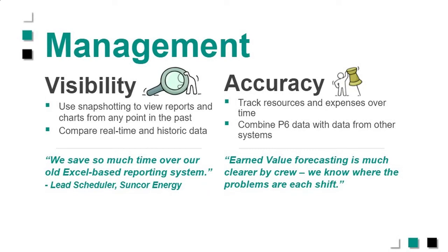And then the ability to do earned value curves, different trends on CPI, SPI, that sort of thing. It's very achievable because we do snapshots. We're not just looking at the current schedule only. We've got all the snapshots in the system. So you can compare back month over month, year over year, two different resources against each other if you're trying to see why one crew is doing better than the other. So it just brings a lot more capability to drill down. And that's what you're trying to really do, is get that data to be more usable, more functional.